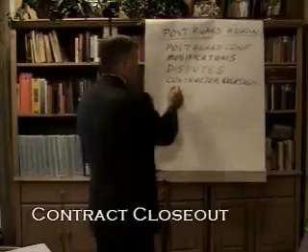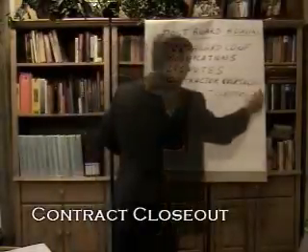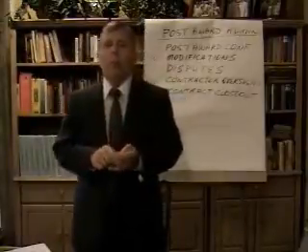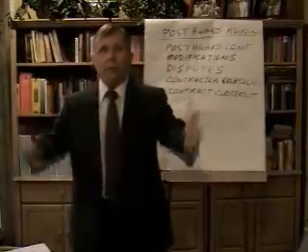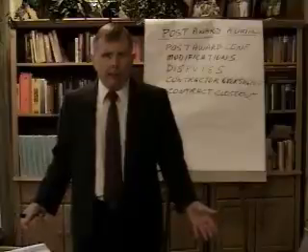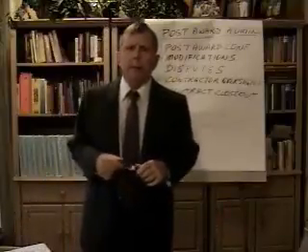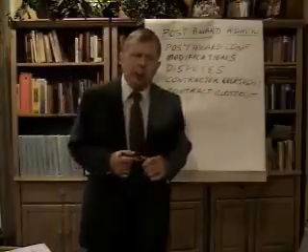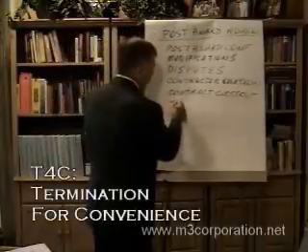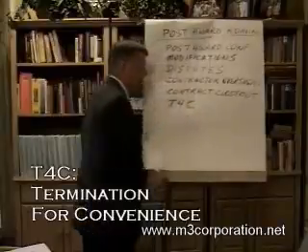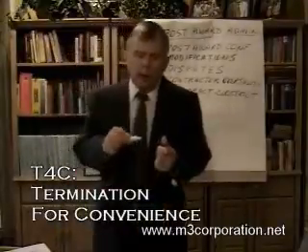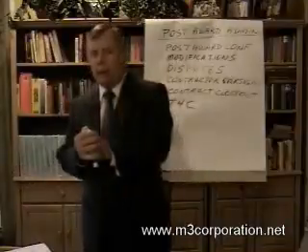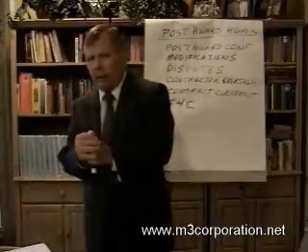Hopefully we'll have contract closeout. The contractor completes the job, we pay them for the job, and everybody's happy. But sometimes that doesn't happen, and we have to actually terminate contracts. If we have termination for convenience, the government always has the right to terminate a contract because we don't need it any longer and pay the contractor for the work that they have done.